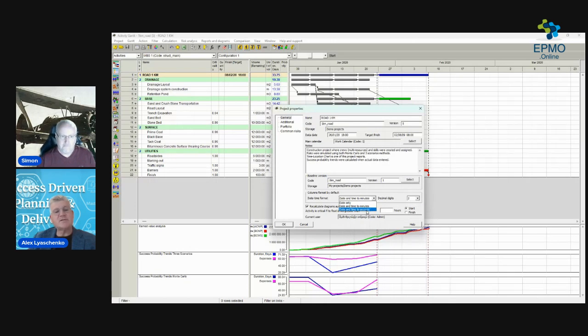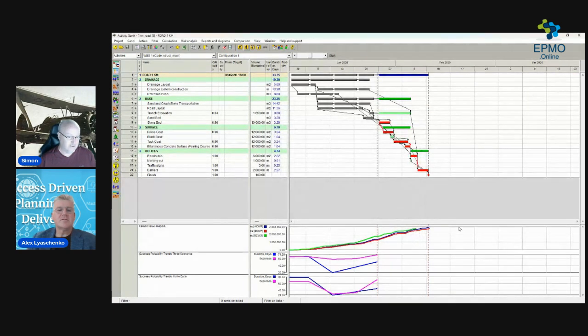I've been a couple of times in a project when each minute matters, particularly when we're working with a certain short-term time window, say 2 hours, or a maintenance project which you really want to analyze. For these projects you go into seconds. I remember projects where I've been in the minutes, things like software release. If there are tasks to do during the software release, you want to make that as small as possible, and you want to be as precise as possible about when it's going to occur and when it's going to finish.